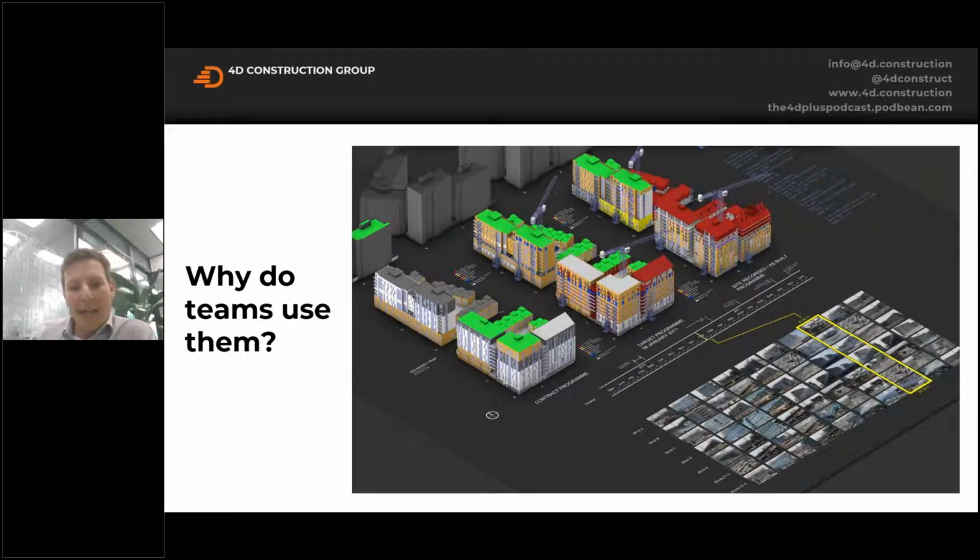We can see on the far left, there's the contract program over here. Then, based on changes in agreement, there was the revised target program. And then on the far right, you've got your actual site recorded situation. So what the final impact was on that site. Now, I did lots of research into this, and what I love about this tool, or the way that this was presented, is that it links to real life photographs. And in the top right, I'm not sure if you can see it properly, we also have 3D detailed setups of some of the big issues, so the scaffolding, layout and access on this job.